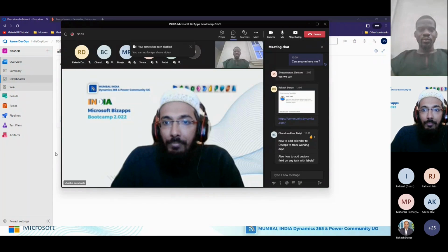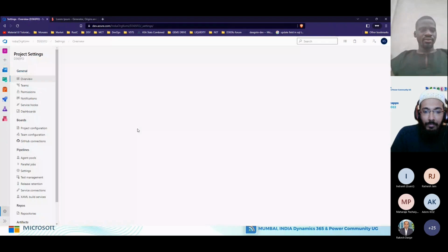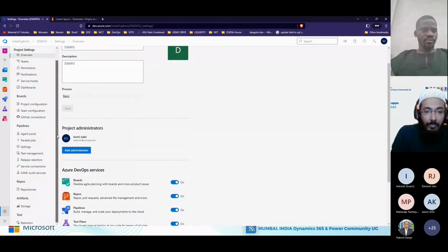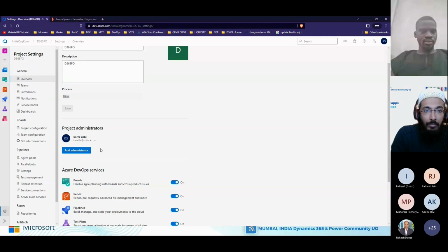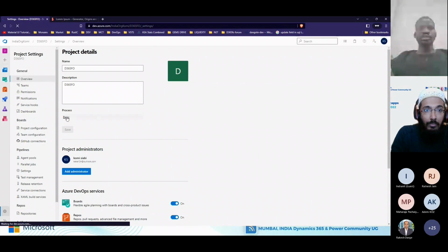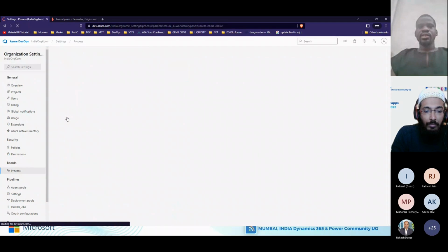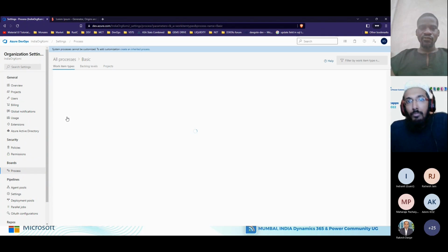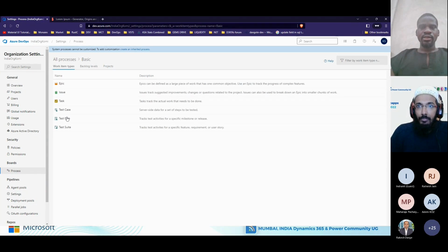Okay, calendars for working days. All right, so under the project settings, there is where we can adjust. So let's come here, the process. On the process, what is obtainable currently is when I'm creating the task here, we can put a start date and also put an end date, right? So when that end date is elapsed, we can receive a notification. By default, you don't have that available. You have to come back to the process you picked and you have to customize that.